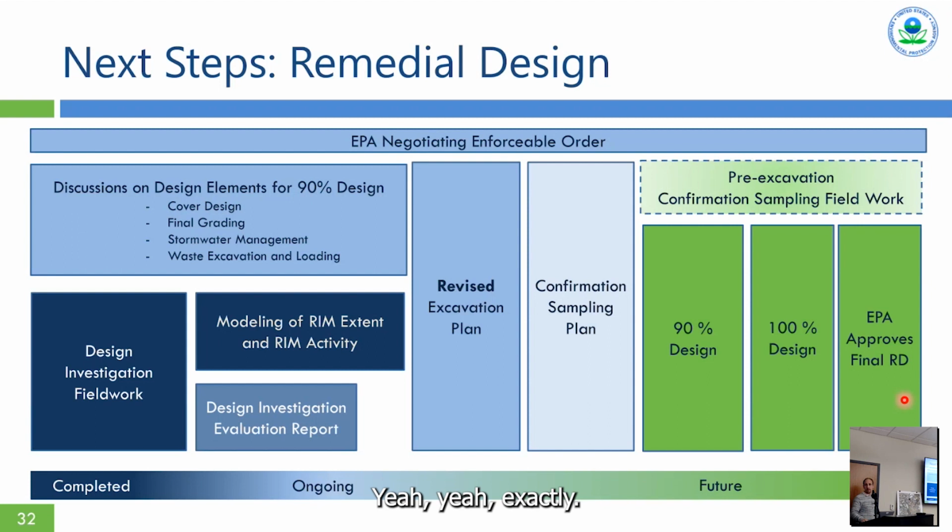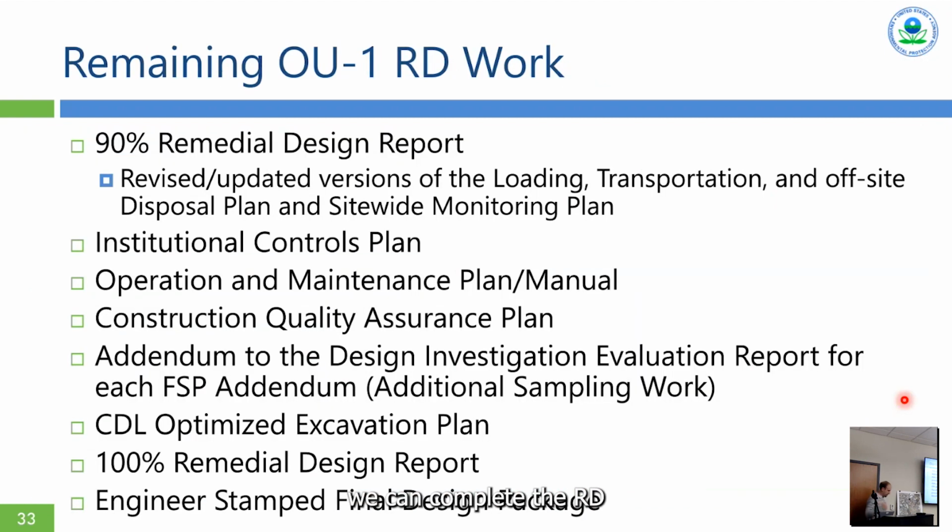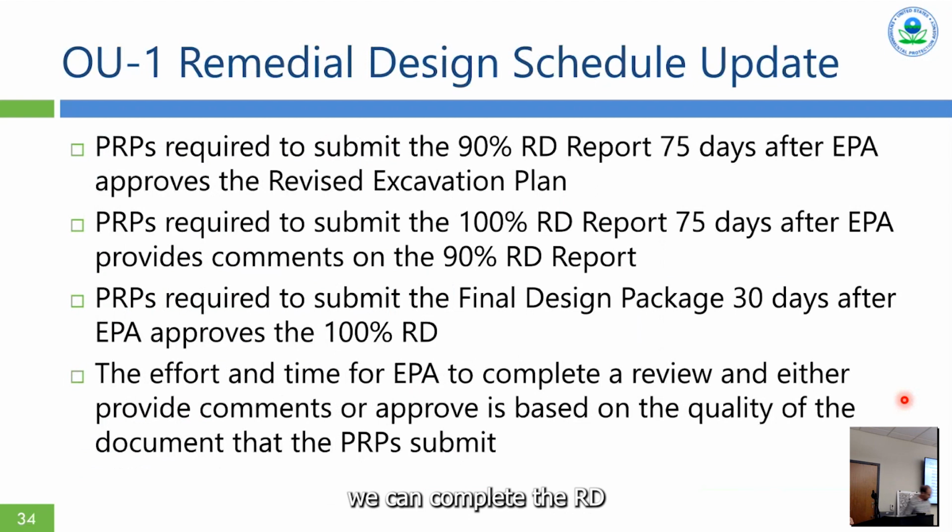Exactly. That has to be done before we can start the RA. We can complete the RD, but can't start the RA until that happens. We want that to happen before the RD is finalized, and we're working hard to try and make that happen. So this is as good of a schedule as I can give you at this point in time.